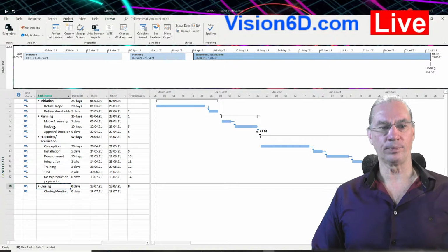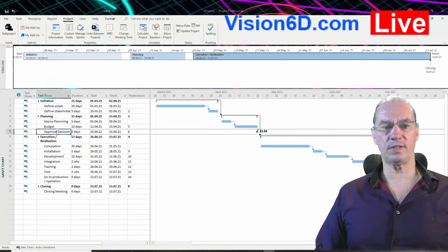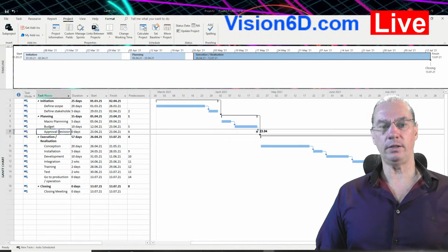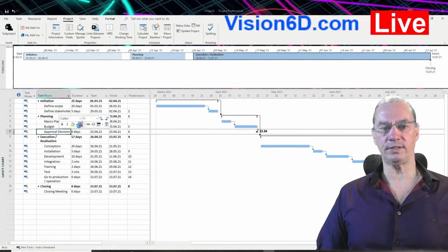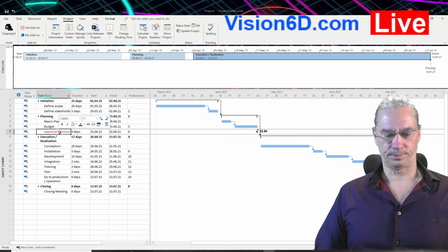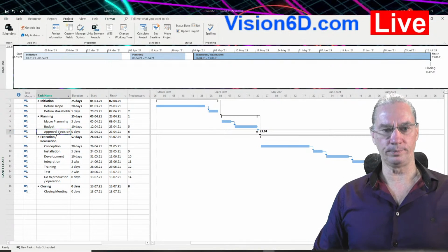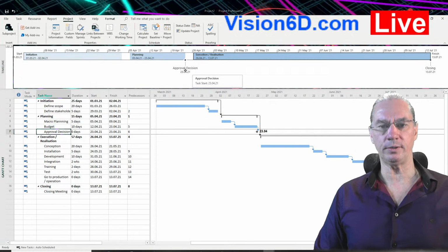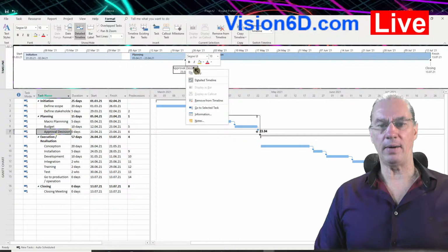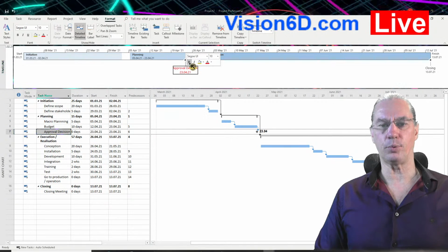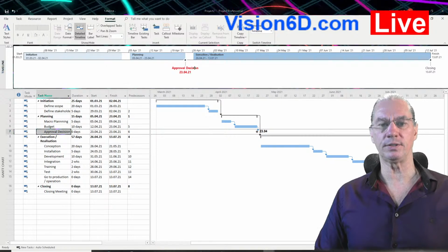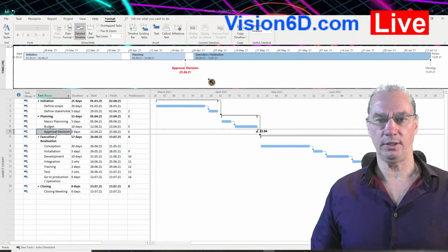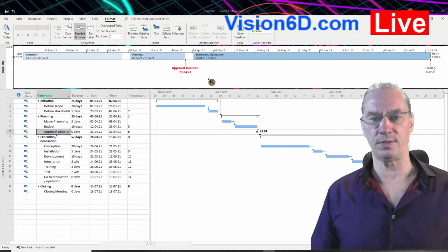What I want now is also to have the stakeholders be aware that I need their help for the approval. So I want the approval to appear on that timeline, so I will add it. What I'm doing is adding a milestone to the timeline, and it's an important milestone because it's the decision to go ahead with the project. It can be, let's move to the execution phase, or not.